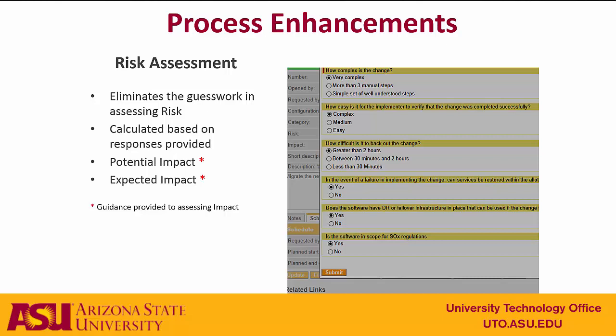Another process enhancement is the ability to check for conflicts. One check that we do is to ensure that the scheduled change falls within a scheduled maintenance window and does not occur during a blackout window. Another type of conflict that we check for is other activities that center around the same configuration item that you're planning on changing. This helps us not have two changes simultaneously that might cancel each other out, affecting the same CI.